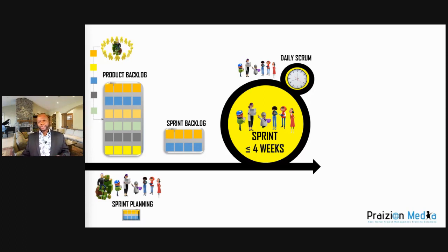We uncover these things, but we want to make sure that they are taken care of after the meeting, not in the meeting. Impediments impede you and slow you down. Obstacles are in the way, and it takes time and effort going around them or going over them. And then we have blockers, which is dead in the water. You're just stopped. You can't move.